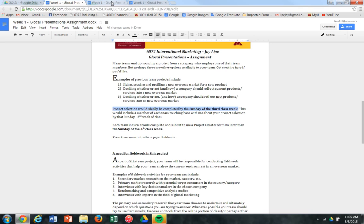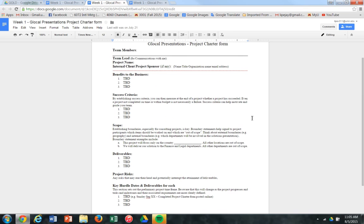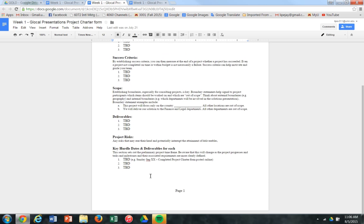Let me just show you what this project charter looks like. Here it is here, project charter form. Those of you who are in consulting or have done consulting work, you know that sometimes the scope on a project can creep out of control and so this project charter form is important for scoping reasons. We're interested in knowing aspects of which market you're talking about, which product, which firm, what are some of the constraints, what would be the deliverables, how would you judge it to be a successful project. So you can see success criteria there and then we provided down here some key hurdle dates and deliverables.